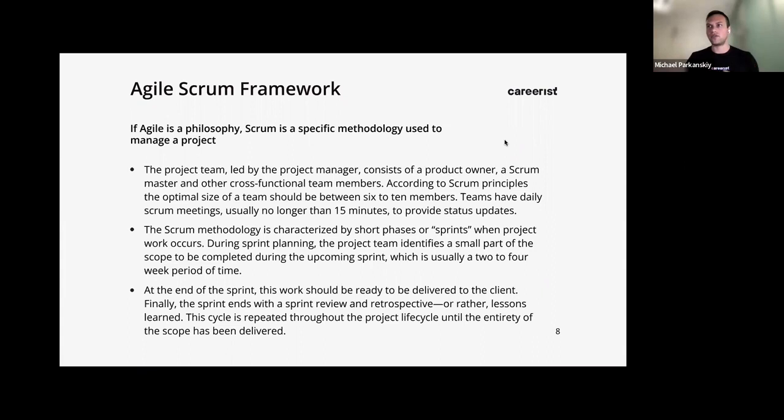and you can start figuring out, hey, what are you working on? What are your blockers? What's going on? This is what I do every day at my company. We have a daily stand-up in the morning, and we get on the call because we all work remote. We get on the call every day for 15 minutes. It's called stand-ups because usually during those meetings, if you're in the office, you have to be standing up. It's not long enough to be sitting down to take notes, but it's long enough for you to get tired of standing up, so you can just talk to each other real quick.